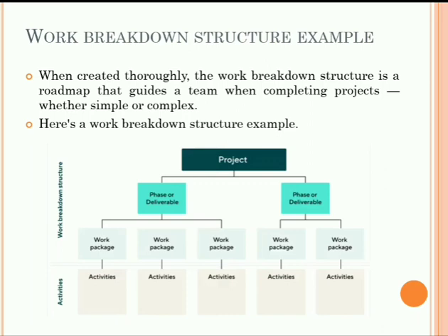The next step is to set work breakdown structure levels. In this, the levels are what makes a work breakdown structure a hierarchical deconstruction of your project scope, as defined by the Project Management Institute in its Project Management Body of Knowledge book. You will need to start with the project's final deliverables and think about all the deliverables and work packages needed to get there from the start.